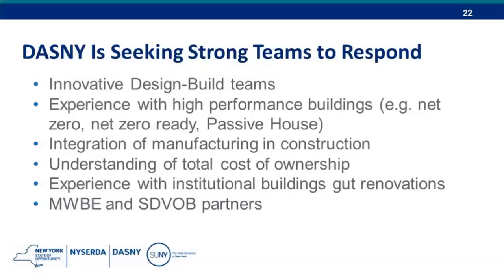And then the design needs to change if the manufacturers say, no, but we can do this. So that's why we need a design-build approach. It is not going to be easy. It is not going to be exactly perfect, but it's a better entity for achieving that collaboration than design, bid, build. And to keep a lid on the cost is what the experience has shown us.